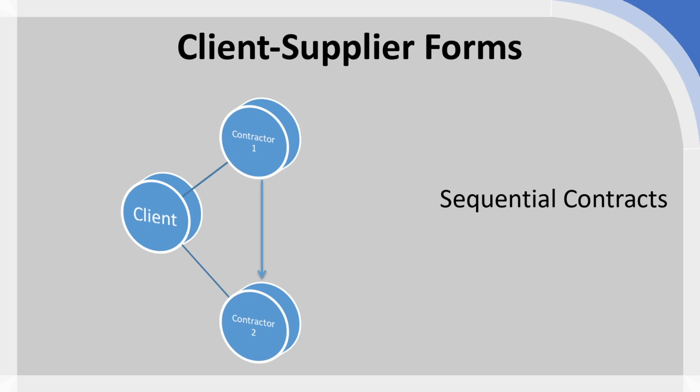Therefore, there is a degree of interaction or handover of deliverables between different contractors. So we used an example when it came to parallel contracts of renovating a room. One contractor needs to go in and, let's say, repaint the room, then another contractor needs to come in and do their work. So that would be a case where your contractors need to carry out their work in a particular sequence, but otherwise there's limited to no interaction between the contractors themselves. So the contracts can run in parallel, and the coordination can be done by the client.